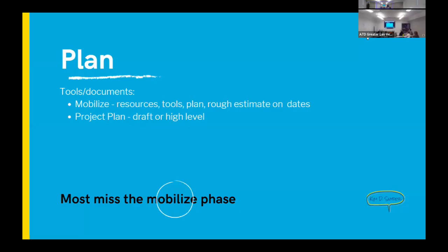And so it could be the charter, right? Typically it's the project charter in there. Again, I just want the objective of the charter at a minimum. And I usually just put a line of the objective of the project. If I'm on a large project, and a client's paying for it, I put a charter in because that's expected. If it's an entrepreneur, we're putting a one-line objective, so I want to make sure they can check that.